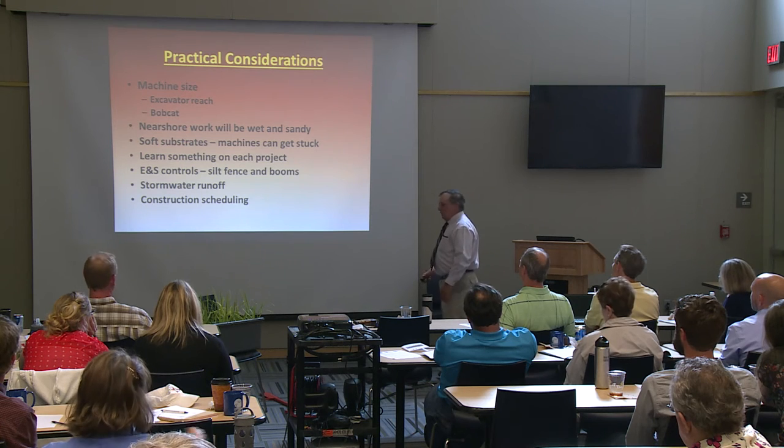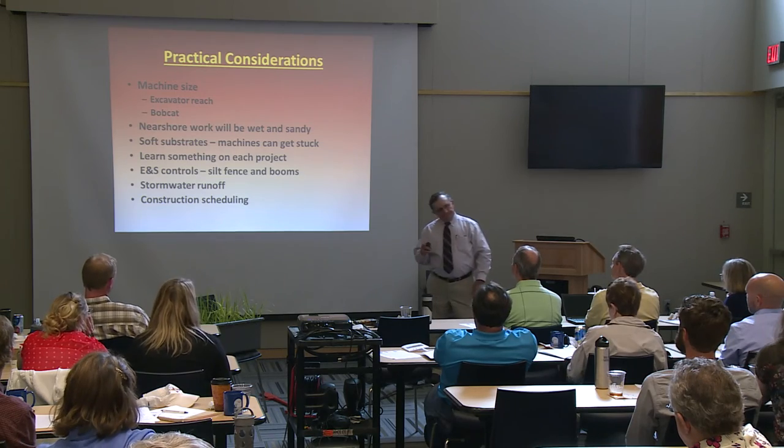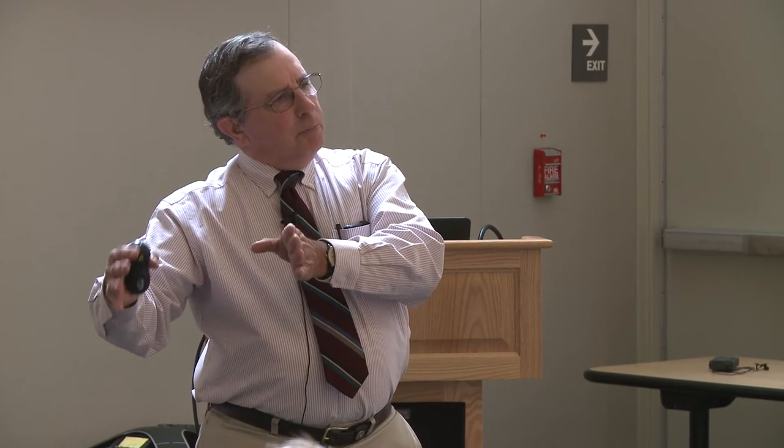The last thing, and I'll quit talking, I'm running out of gas. Construction scheduling. It's really, really important because of getting your construction scheduled around when you want to plant. Okay, so if you want to plant tomorrow, you need to start building in December. You need to factor in whatever you think it's going to take so that, to the extent possible, you can be finishing up in the late spring, because that's the optimum planting time.